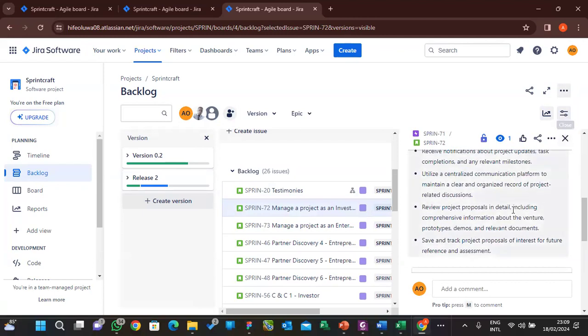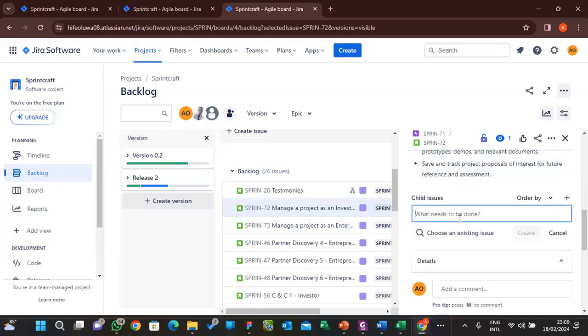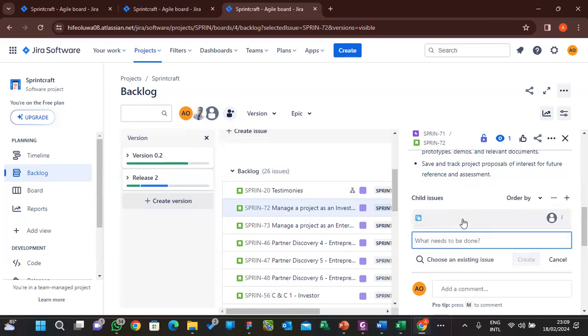So now what you need to do as a Scrum Master is create a subtask for these 2 guys, because you have a tester there. The tester is going to do his own part in this particular user story, while the developer is going to do his own part on this same user story before it can be completed. So you come here, and the simple thing to do: development stage. Assign a developer.